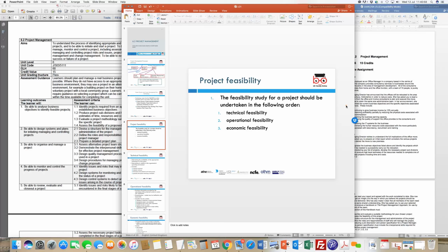So when we look at the feasibility, I think when you look at going and visiting a few venues to see if this is going to be suitable for the birthday party, is it going to be central enough, is it going to be easily approachable, is there enough parking space? When you look at all those things, you're looking at the feasibility of planning the event and making it successful. And those first few trips that you go and take, and meet and take quotations, are to understand how well you will be able to plan this particular event, and all of this falls under something called project feasibility.